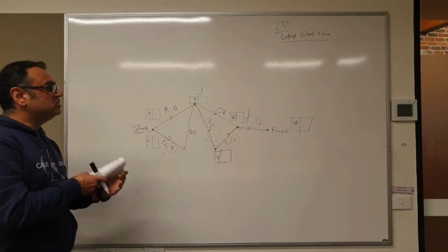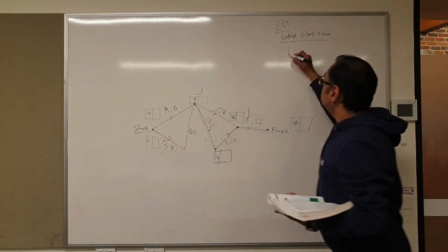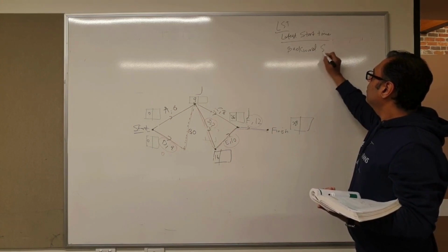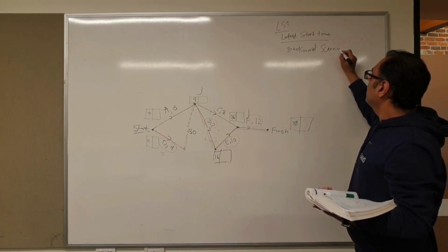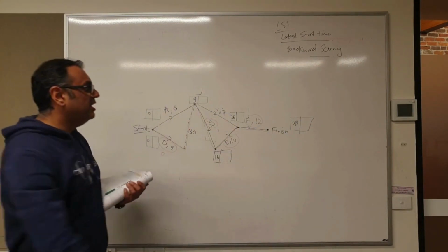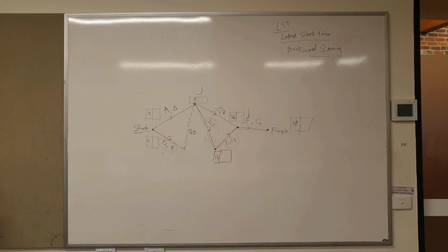Now let's try LST, and we use a technique called backward scanning. Backward scanning scans from right to left.